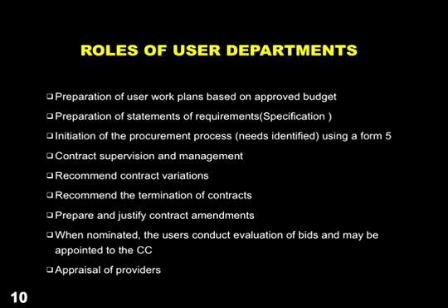There's a form called Form 49. And we do that by appointing you in writing. And it's signed off by the principal, who is the accounting officer in this case. So it is one of the major roles that you have to supervise and manage the contracts on behalf of the entity, that what was contracted is delivered in terms of quality and also in terms of amount.